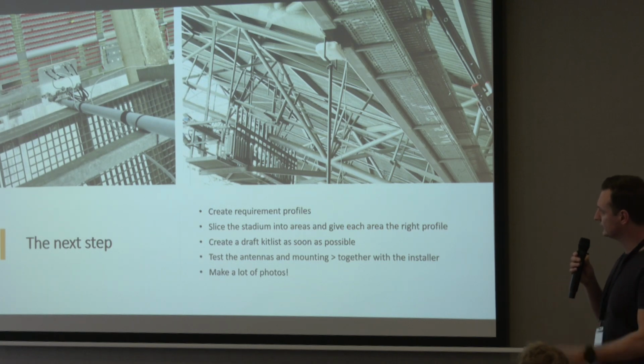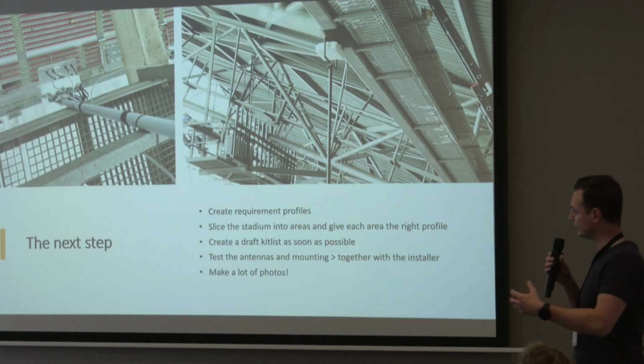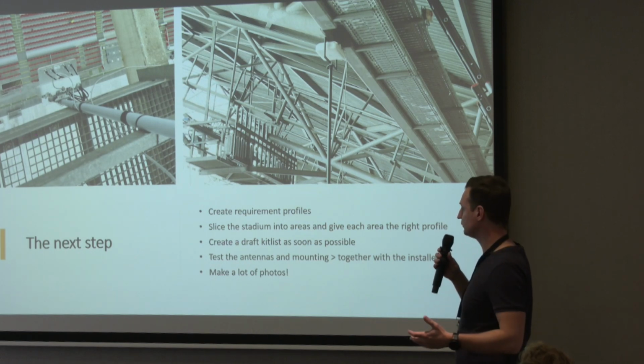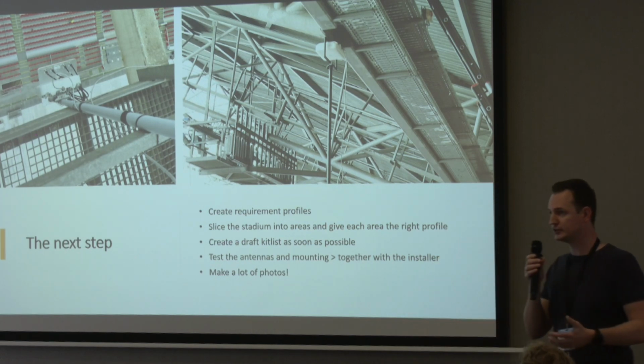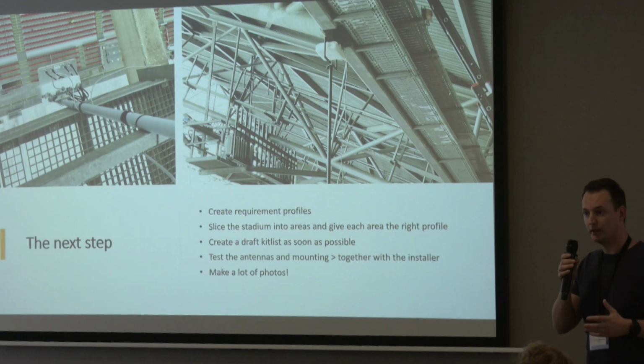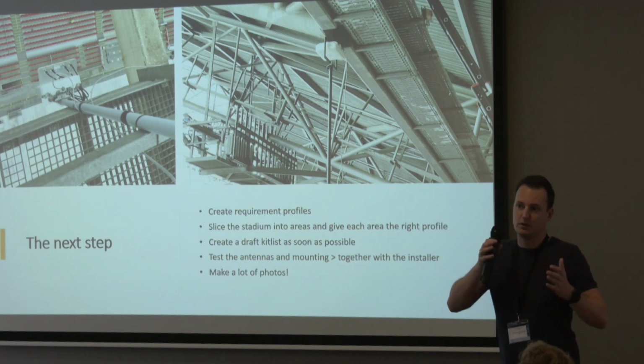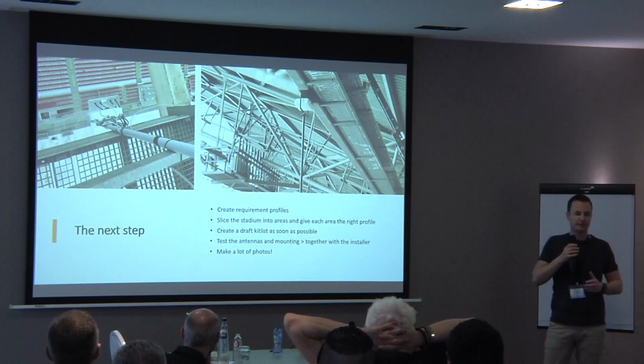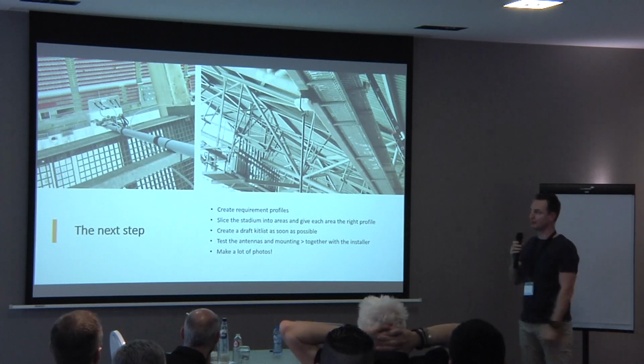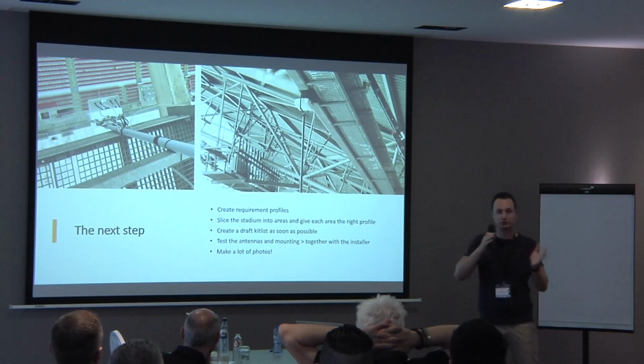And each part you give the right requirement. From that, we try to create a design, but also create a draft kit list as soon as possible, so that the customer can already place a draft order for all the APs, because if you're talking about this amount of APs, it takes a lot of time to get them.